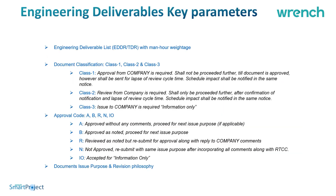These deliverables can be categorized by type — required for approval, required for review, or for information. You can pre-define the approval status codes based on your clients or internal process, and you can specify the revision philosophy and revision series such as A, B, C, D, 1, 2, 3, 4, or R1, R2, R3.